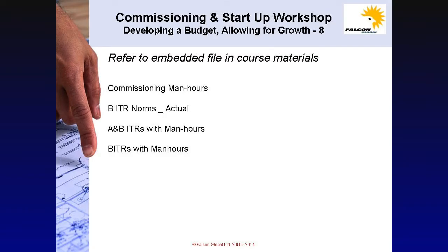The notional project completed in Southeast Asia has actual billings for check sheets, but does not include punch list items. On this notional project, with excellent productivity, we are looking at around about 6,250 man-hours to commission one system. That is the scope of A, B and C check sheets.